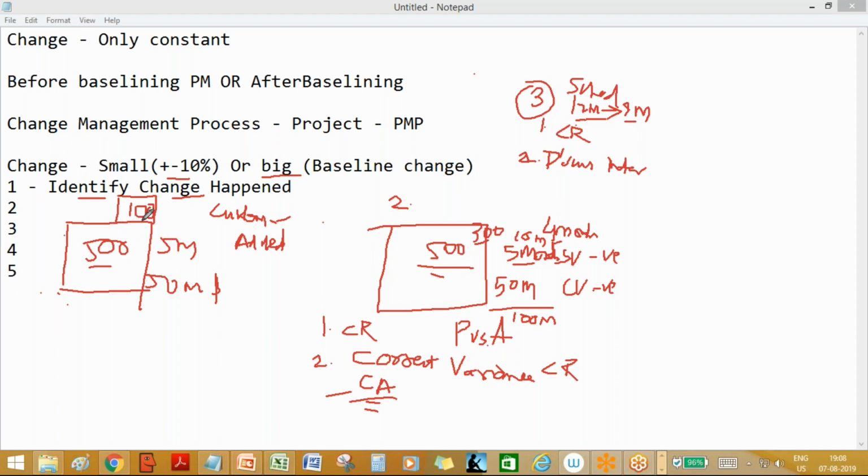Now the customer agrees, yes, 100 features new. It should not happen that he says it's an issue, meaning it was part of the original scope, and you say it's an enhancement. That friction is always there, but it should be very clearly identified that 100 features are new. Here also, you are clearly raising that request. The original plan is not achievable because of the productivity, and through EVM you have revised the plan to 100 million and 10 months as the schedule you are asking for.